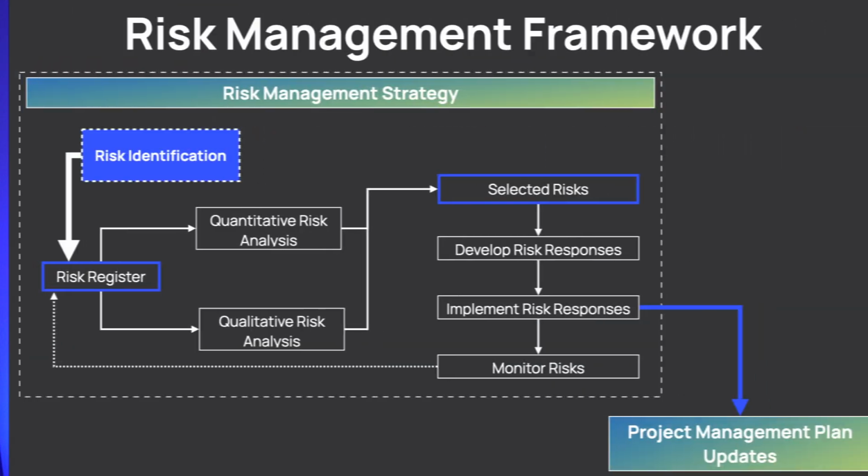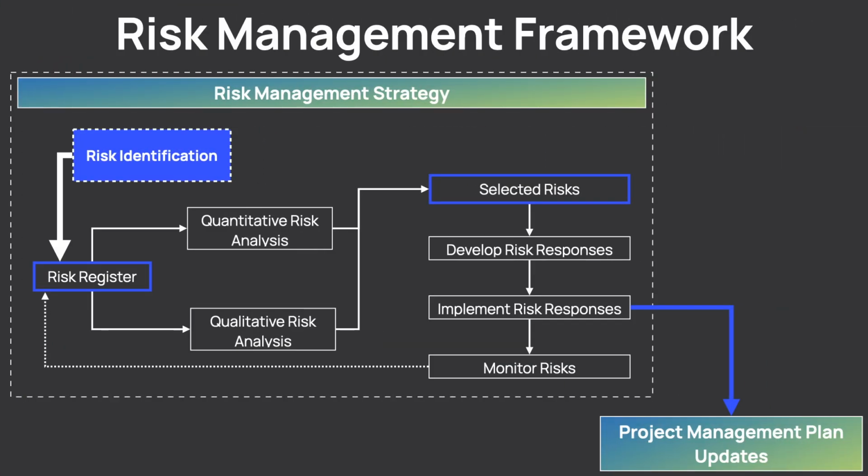Or what's even worse, your risk response plans become additional work for your whole team. So you have your sprints already planned to full capacity and all risk management activities are on top of that work. In both cases, it's just additional work and stress for your team and a lot of frustration for you. The solution is easy but not simple. You need to integrate your risk management efforts into your daily work. It should become a part of your efforts to deliver either a sprint or each separate deliverable.